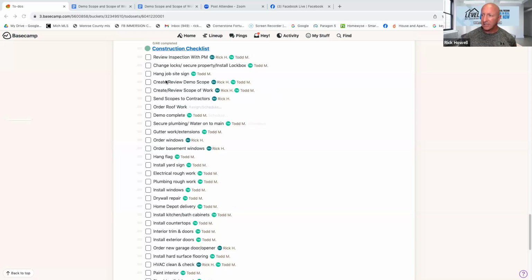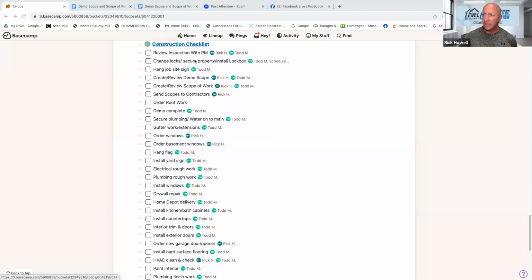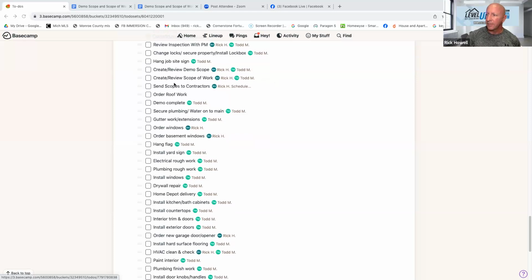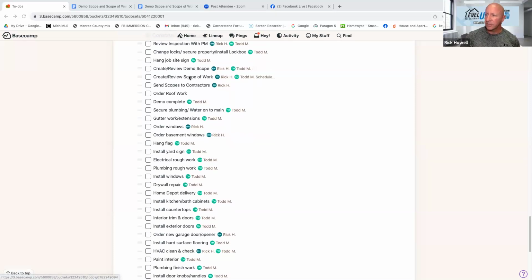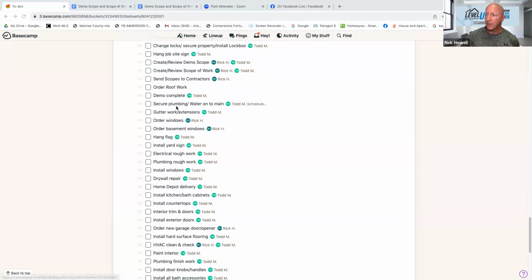Every little detail that's going to happen on a rehab project, all the way down to at the very beginning of a project, you're going to change your locks, install a lockbox for the team, hang your job site sign. For more on that, ask me or check out one of our videos. Our rehab company is called Howell Properties LLC. You can check that out and see how we hang a job site sign that shows all the rules, basically no smoking, no loud radios, all the rules of the job site. Here, create both your scopes of work, do those together with your general.